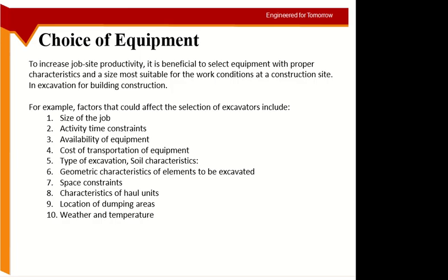The equipment you have to buy, then the company has to ship it, and the shipping can take weeks or months. And then it comes to the customs and you need the approvals, and it sits there for 2-3 days until you get all the clearances and so on and so forth. So from where you are bringing the equipment and how much it will cost you. So cost in terms of money as well as time.